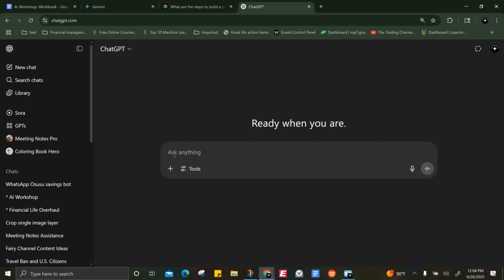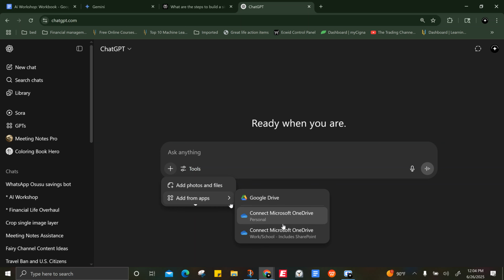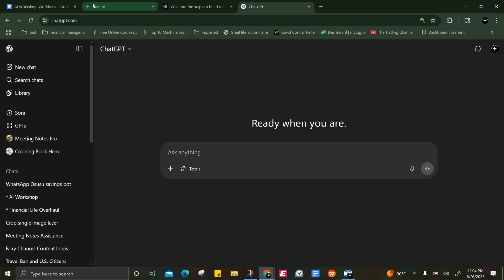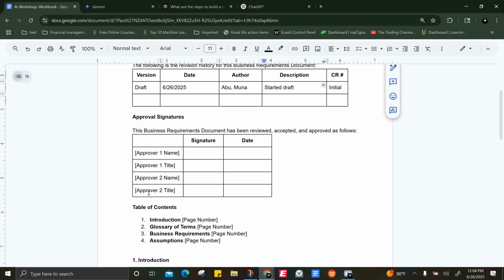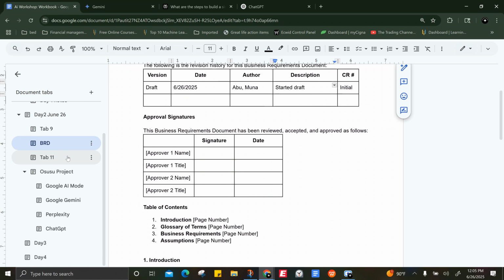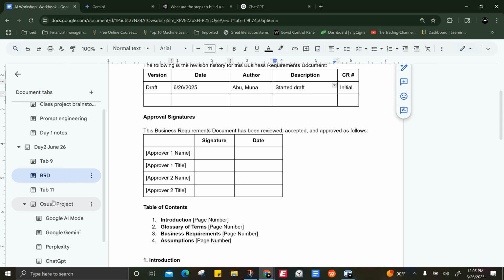Or if I click on here, it should bring these up, and when I click on here, it should bring these up. These are still requirements, but they're very specific, so they're more system requirements. This is just the business requirement. It's high level. It's talking about what we want it to do for the people, the business, what they want out of it. When it says system requirements, you're talking about the buttons, the fields, more detail, and that's more what the developers will decide for projects that move fast.